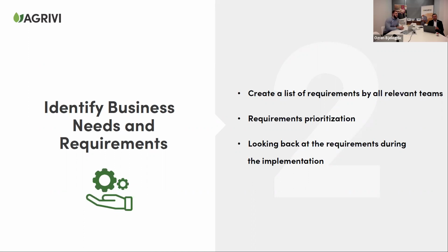And the third prioritization is some of the features and values that are nice to have. Something that is definitely not go-live critical, and something that you can live without, but potentially can make a gap between successful vendors and somebody that might be less successful, right? And so you should be aware of those prioritizations, and they should also be managed later on during the implementation.